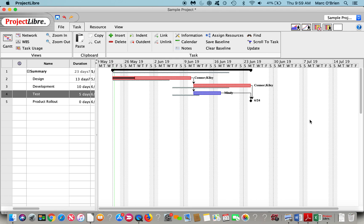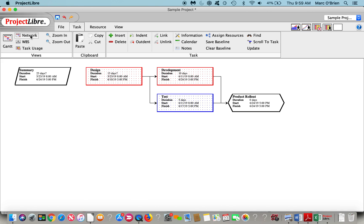With non-critical tasks, there's float on it. I could have moved that and it wouldn't change the project end date. I'm going to click over to the network diagram now, just to quickly show you what this is.